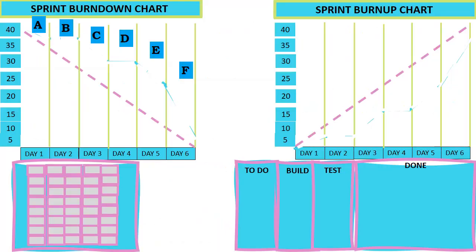Agile teams measure results. Sponsors usually want to know when the project will be done. Once the team establishes a reliable velocity, which is average story points per iteration, the team can predict how much longer the project will take. That is why the team needs to wait until a couple of iterations are completed so that they can give the sponsor a good estimate, which is empirical and value-based measurements.